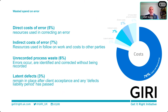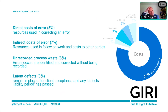7% are indirect costs — the impact on others, particularly delay and disruption and loss and expense claims. 6% is unrecorded process waste where errors are made and hidden or corrected but not recorded, yet they still have an impact. Then 3% are latent defects which manifest sometimes well after handover. Profitability in construction generally hovers around 2–3% of turnover, so the spend on putting things right is an order of magnitude higher.